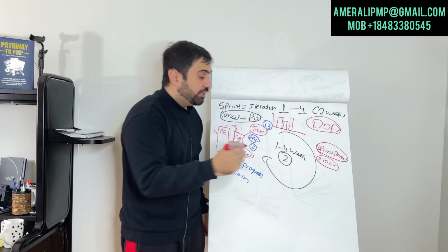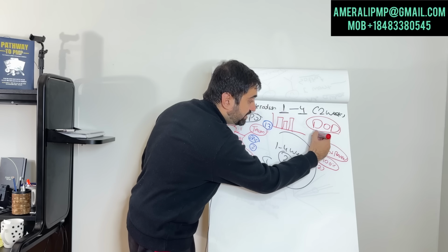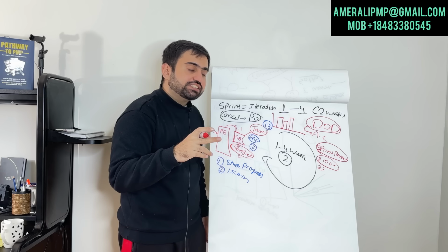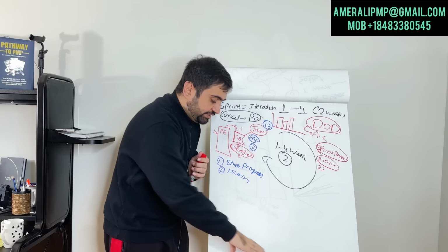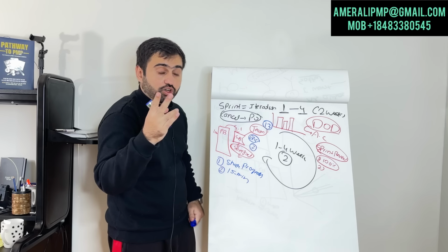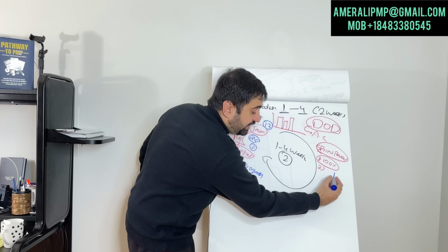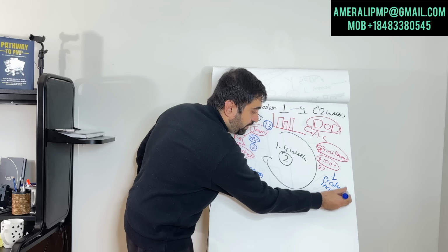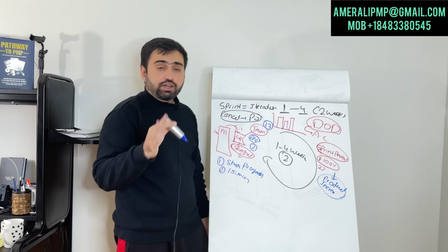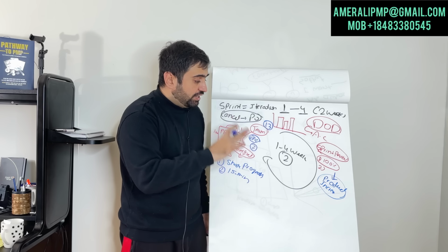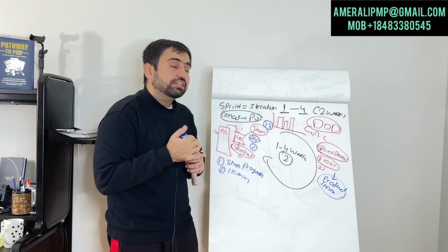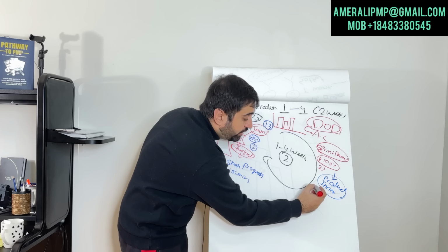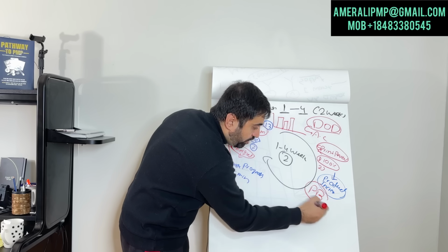I will show to the customer. Customer has an acceptance criteria just like this. It should be almost the same, but they have their own checklist. If they accept a user story according to their checklist, it will go into a document, third document, product increment. Anything that is accepted goes into product increment. Anything that is not completed, anything that is rejected, it goes into product backlog.